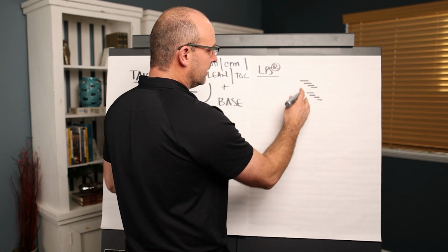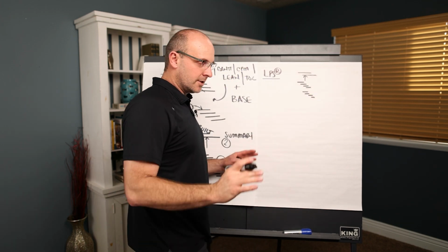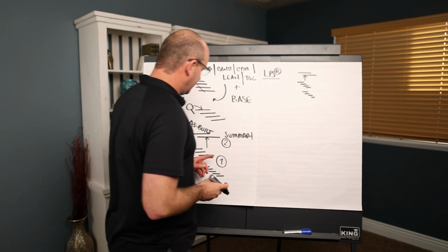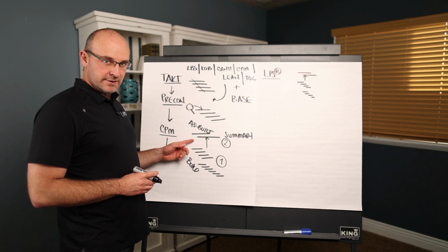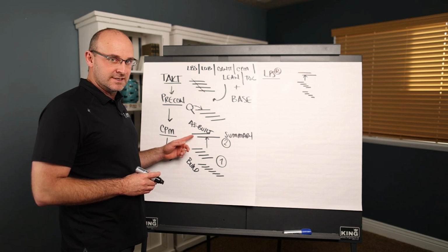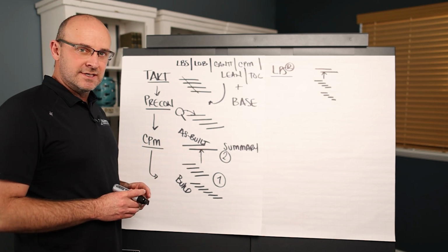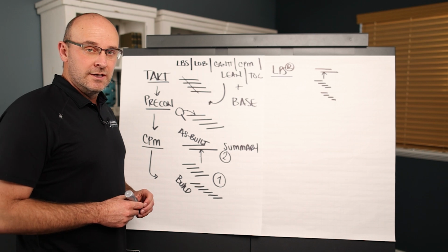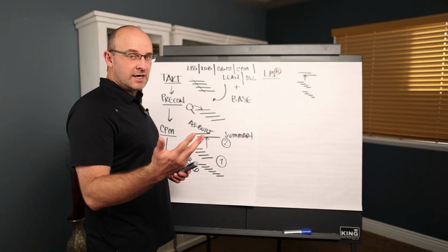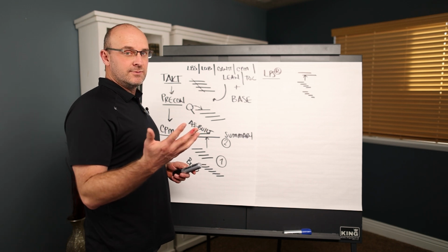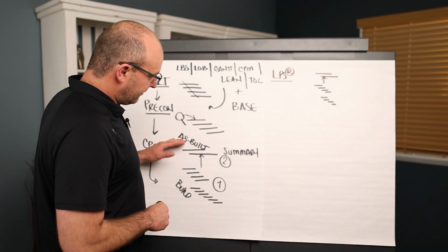So if you have the Takt and you're summarizing it to CPM, which is fine, you have your contract schedule. I'm not going to argue with you. Oh, let me just make this point. You can have your as-built schedule, but any of the methods to analyze the schedule are worthless. Meaning you can follow the Dalbert standard, you can do a forensic analysis, you can do as many fragnets as you want, but there's nothing in here as an as-built schedule that will do anything other than tell you that you're delayed. And the only solution here based on CPM is add more labor, work overtime, crash the activity, rush, push, and panic, bring out too many materials, throw money at the problem. Well, none of those will work. Everybody knows that that doesn't work. So if you have to do it, great, but